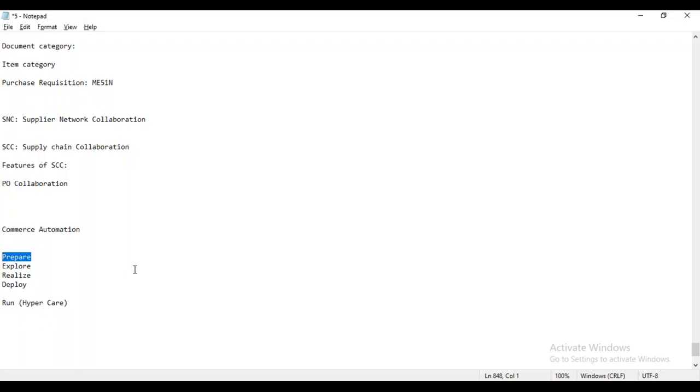And then we have to perform the testing. So first we have to do unit testing, then integration testing, and later we also have to do UAT testing as well. UAT means user acceptance testing. And in between, while doing the configuration, whatever config or step you identified as a part of Katuba, those steps also we have to make a note of in the Katuba plan. Even the Katuba template will be available in that particular repository, whatever you receive from the Ariba.